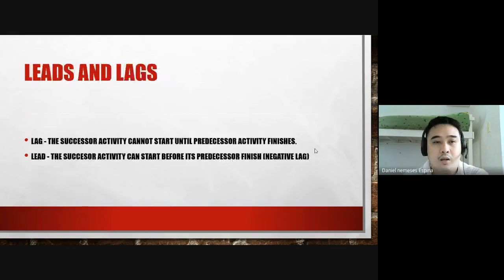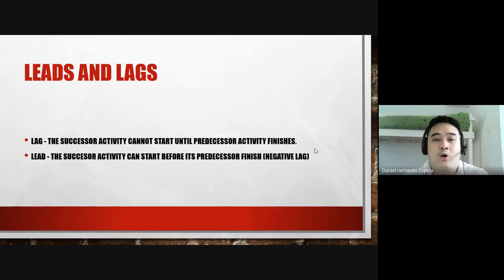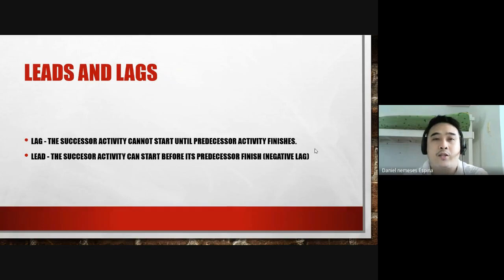Lag means the successor activity cannot start until the predecessor activity finishes — you must wait for one activity to finish before the next can start. Lead is the opposite of lag: the successor activity can start before its predecessor finishes, meaning while the predecessor is still ongoing, you can already begin the successor activity.